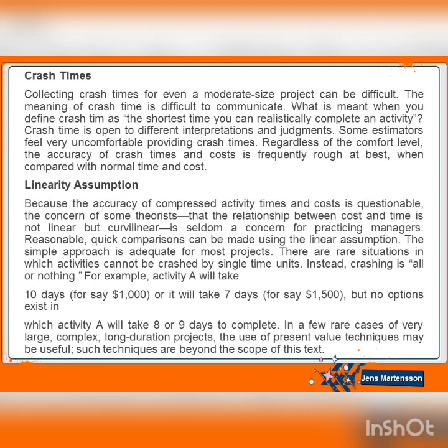There are rare situations in which activities can be crashed by single-time units. Instead, crashing is all or nothing. For example, an activity will take 10 days or it will take 7 days, but no option exists in which the activity will take 8 or 9 days to complete. In a few rare cases of very large, complex, long-duration projects, the use of present value techniques may be useful. Such techniques are beyond the scope of this text.